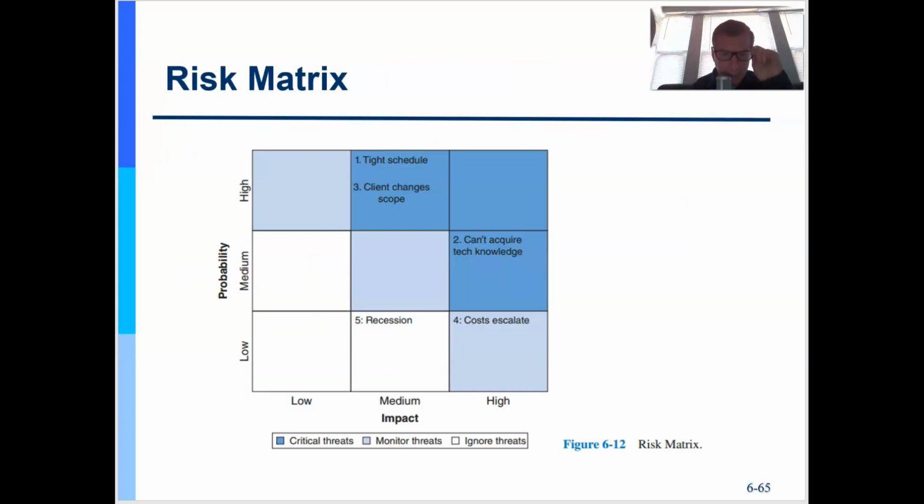And I can do a risk matrix which may look something like this. It could take various forms. Even though it's qualitative, even though it's subjective, you can use letters, you can use numbers, or you can use words. And we're always assessing, in qualitative or quantitative risk analysis, the probability versus the impact.